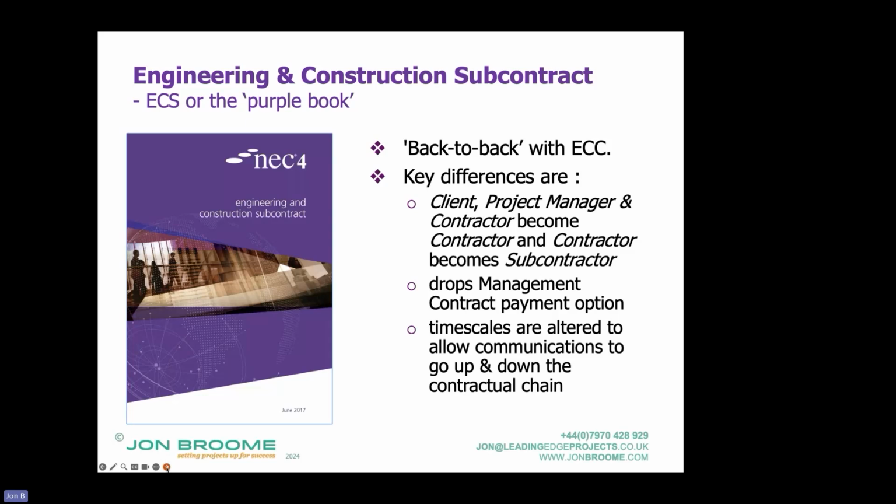And they specify up front what the conditions of contract are going to be. If they're subject to procurement rules, if you start changing something significant, then a losing tenderer could potentially challenge you. So they tend to run on the same version until they expire, if you like, at the end of the framework. But yeah, if it's a one-off contract, use the latest version, because they've learned some lessons and they've refined it.